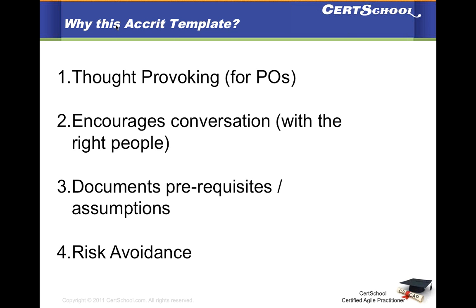Okay, there's a question on sprint planning. Yes, sprint planning is something that we do before the sprint starts, of course. So you want to finish your sprint planning when your sprint starts. The prerequisite for starting a sprint is that you have finished all your plan, and you have committed to the user stories that you know you will be able to complete in a particular sprint. There are exceptions, of course, and we will talk about them.